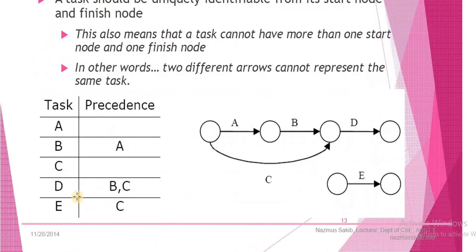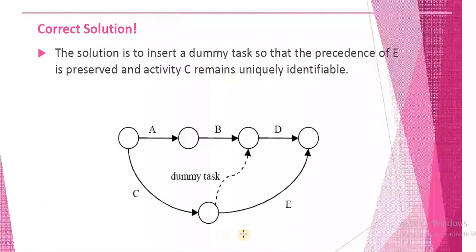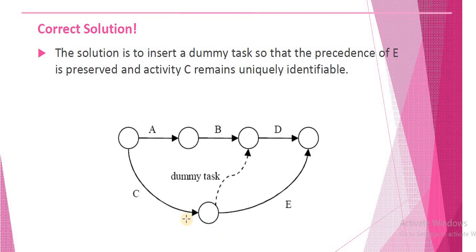The same conflict arises, so we add a dummy activity. We add a dummy task and check the incoming edges and outgoing edges so that the precedence relationship is maintained. In the Activity-on-Arrow diagram, when a node is inserted, we check whether the precedence relationship is preserved. It depends on which node is added by the dummy task and where the dummy activity is placed — that will matter.